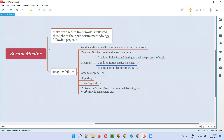The Scrum Master will also conduct a sprint retrospective meeting at the end of every sprint. As we know in Agile Scrum methodology, work happens in iterations called sprints. After each sprint is completed and before the next sprint begins, the Scrum Master conducts a sprint retrospective meeting where everyone discusses what went well in the previous sprint, what didn't go well, and what improvements can be made for the next sprint.